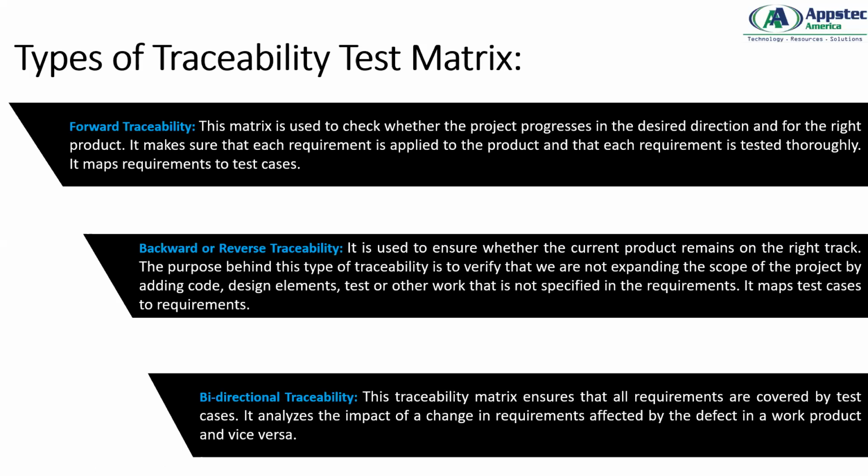Rather than doing that, we keep a traceability of the project, which is actually done by the project manager in alignment with the business analyst as well, where we see that the activities assigned individually are done completely, so that when we integrate the code, it becomes complete. Let's say I have 10 steps of solution that need to be developed, which I have distributed among four developers. It's not that you will always have an equal number of activities. 10 divided by 4, somebody might have 3, 3, 3 and 1, something like that.